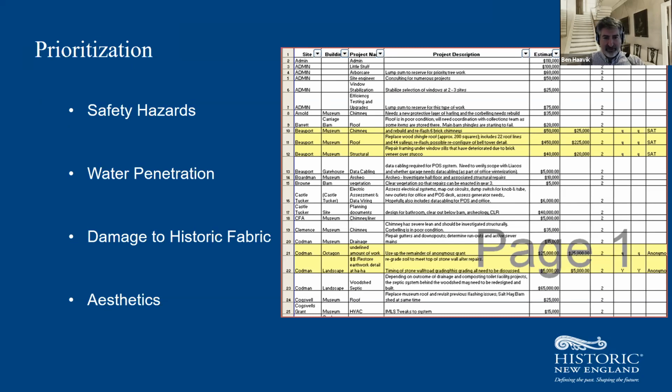I always talk about damage to historic fabric. Sometimes we're like, ooh, that paint job, it's failing, but the wood is still good, because I'm juggling 160 buildings, 160 paint jobs. So sometimes I'm like, how bad is that paint and how bad is it to the wood underneath? Do I like doing that? No, but at some point you have to balance things and say what's worse than the other.